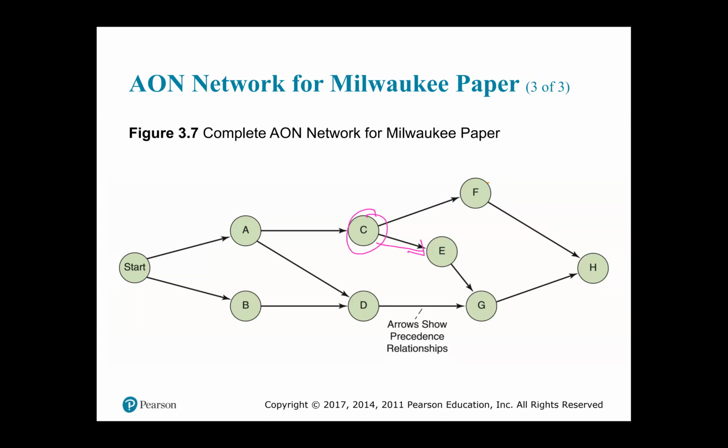Good. Now, likewise, if you go back to your table, across from activity F you see activity C. So it means another arrow has to come out of activity C. There is the purple arrow coming from activity C to activity F. Because if you look at activity F and go across under the immediate predecessor, you will also see C listed.